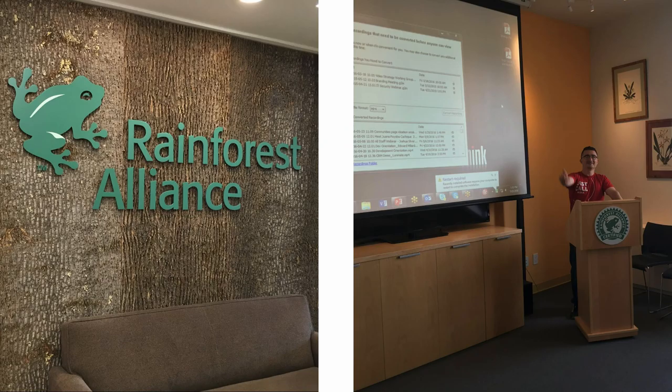And we ended up making 10 piles. So one of the important things of this part of the exercise was that it brought the concept that not everything's going to fit, in a very collaborative, meaningful way. We have these physical cards. We can only do 6 piles. Here's pile 7, 8, 9, and 10 of stuff that we'll have to do later. We only have 6 piles.